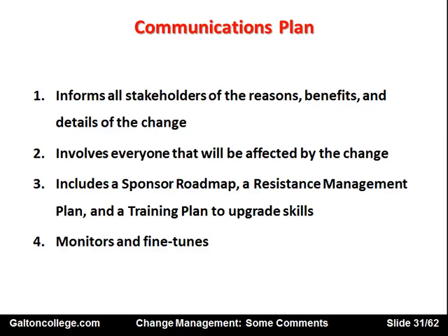Perhaps despite all the planning, some small issues might have got through that weren't anticipated, and the communications plan should allow for monitoring, and it should allow for fine-tuning as it goes through, and be able to communicate this right throughout the organization to everyone to say minor modifications were required, and make sure there is approval right throughout the organization, so that if there are any objections or any comments, they're fed back efficiently to the change champion, who can then perhaps, if need be, call a wider meeting to discuss the implications of any fine-tuning that was felt necessary.